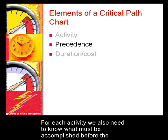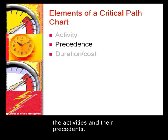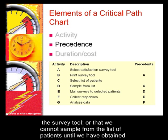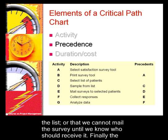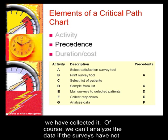For each activity, we also need to know what must be accomplished before the activity can start. This is referred to as a precedence. A critical path chart shows both the activities and their precedence. For example, we cannot print the survey until we have selected the survey tool, or we cannot sample from the list of patients until we have obtained the list, or we cannot mail the survey until we know who should receive it.